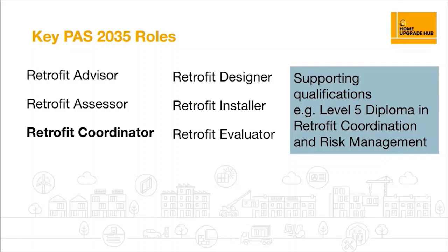The role of the assessor is to carry out the assessment. We talked about that a little bit already. They're collecting data and supplying it to the coordinator. The coordinator is central to the whole process. They're the glue. And ultimately they have responsibility for the project complying with PAS 2035. The coordinator might also fulfil other roles, which is where things can get slightly murky sometimes, and it's helpful to have that kind of clarity in your supply chains and procurement exercises. So a coordinator is also allowed sometimes to be the evaluator.